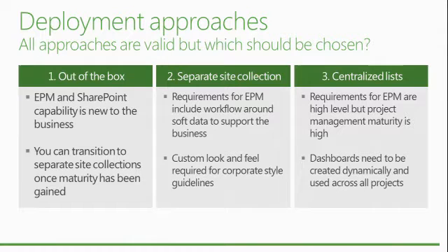So if you go down the out-of-the-box approach, you still have your siloed sites, but at some point you could then transition, once you're used to using your centralized resourcing, your centralized planning, you're used to SharePoint, and you've trained up your users about how uploading documents works, how risks work, etc. You can transition into option 2, where you can start customizing the look and feel, and you can start to have more standardized risks and issues, that kind of thing.